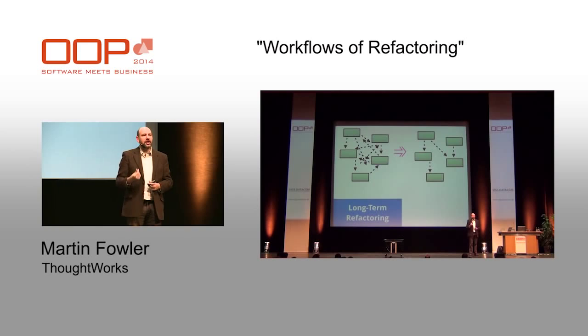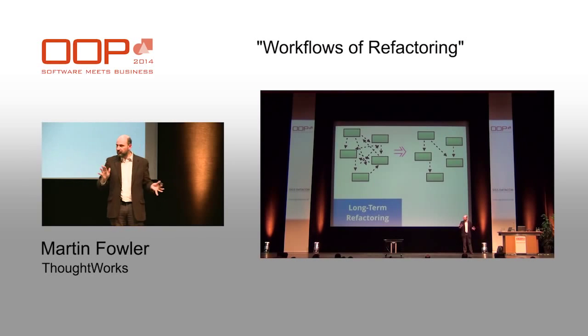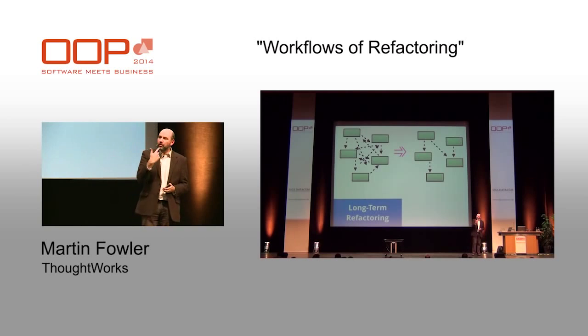That gradually inching towards a goal, I find it preferable, because for a start, it doesn't get into planning refactoring steps in a plan, but it also allows you to learn from the process of reaching the goal itself, and keeping the code stable and clean and always ready to deploy in a good continuous delivery environment as well. You can actually surprisingly achieve quite large refactorings by doing them in this very small, gradual, step-by-step way.